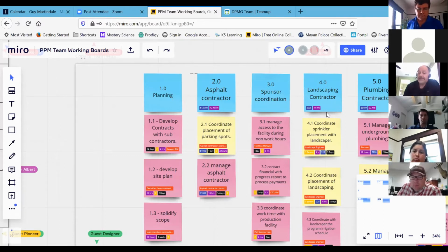The homework assignment is to define all your stickies and all your notes, make sure they're all accurate in the right buckets with the right headers, cost everything out and total all the hours. Put that into a post-it note, all totaled out and summarized, and then do a quick review with your team about what number you came up with on your project charter and brief, and what your WBS actually yielded you. And if you're higher or lower, the conversation next Friday will be, do you know why?